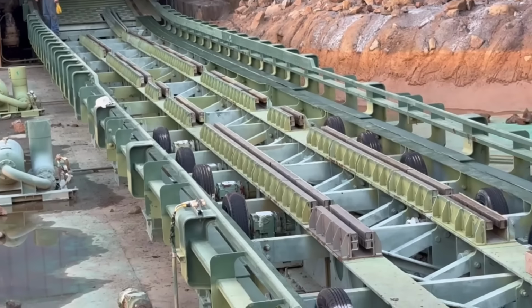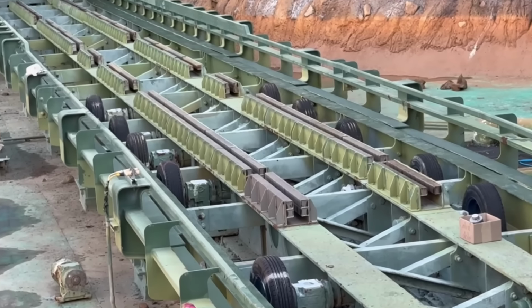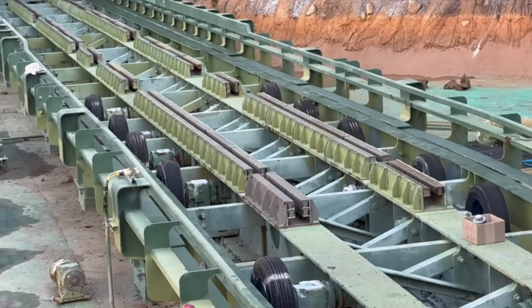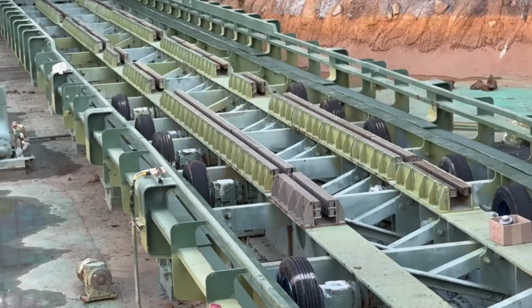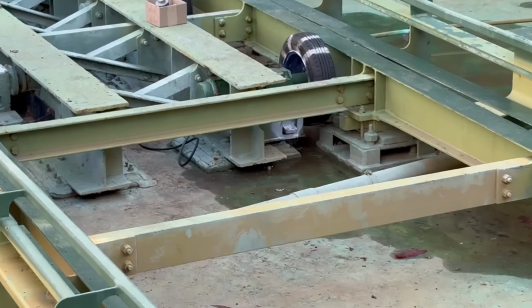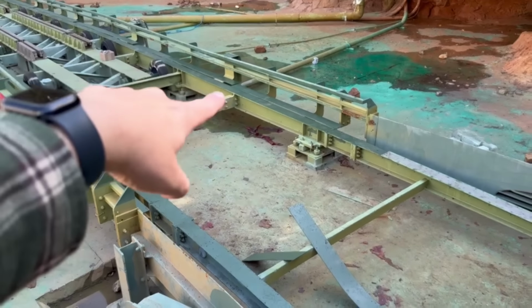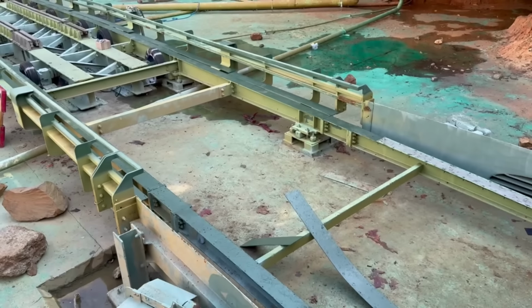Maybe it's a ride that won't run because of the weather. It's like, no, that's too cold to run that ride. It physically won't operate in that temperature. So it's like, okay, then that would be that ride's planned downtime for that refurbishment. Flat rides are easy to schedule into stuff. So everything is just a balance. It's all about holding that schedule.